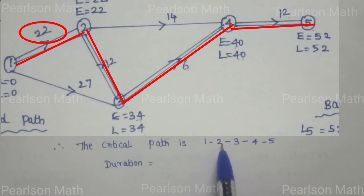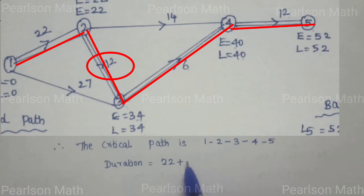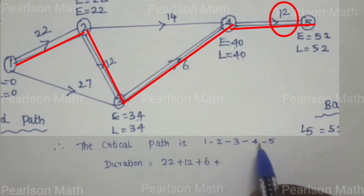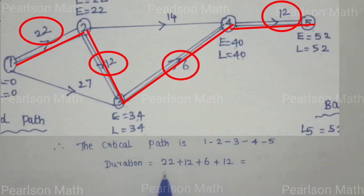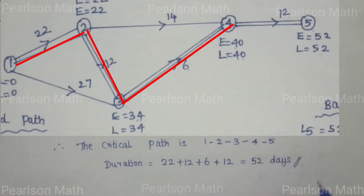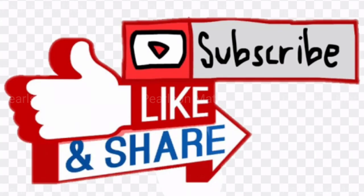Now, duration equals: 1 to 2 duration is 22, plus 2 to 3 which is 12, plus 3 to 4 which is 6, plus 4 to 5 which is 12. I will add 22 plus 12 plus 6 plus 12 equals 52 days. That's it.